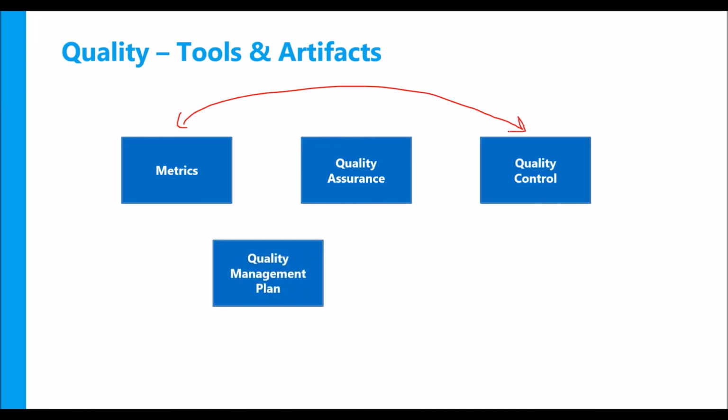Your quality management plan is typically a document, and then you use variance analysis. Variance analysis, you compare expected versus actuals, right? Whether it is matching or not matching, if not, why, and you go into root cause and try to fix it. So your variance analysis is as simple as that.